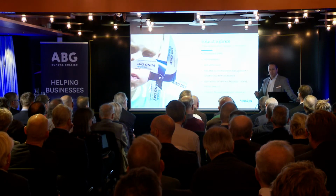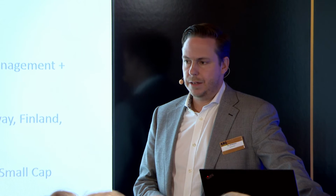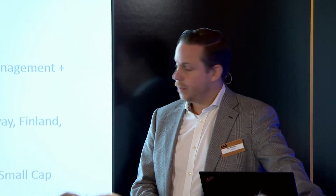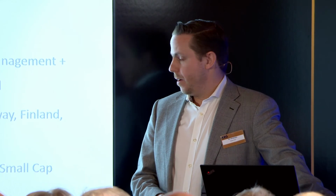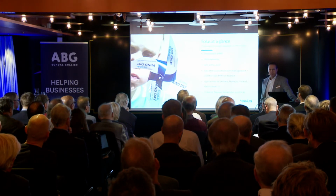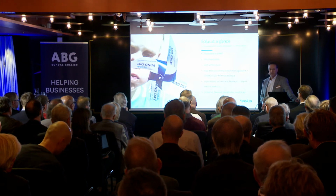The idea is to develop projects, and when they're fully permitted, to procure turbines, balance of plant, the civil works that is needed, and to sell wind farms or other renewable assets as turnkey assets, and then to operate them on behalf of the investors. When we have a ready-to-build project, we turn to our customers or other potential investors presenting the project, and run a couple of rounds with the negotiations with them. And if we can conclude a deal, then we order turbines and or the civil works and start the construction.